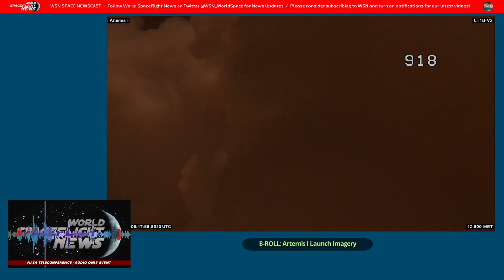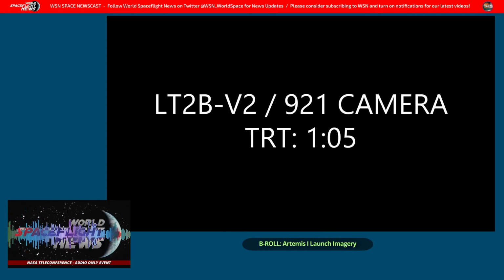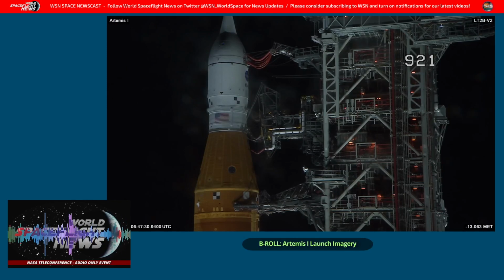So the job of the Artemis I crew module is not complete. We have taken the heat shield off. We have removed the avionics that's needed for Artemis II. We are in the process of doing, actually, when I say we, the exploration ground systems, Sean's team is doing all the work for us, doing the decontamination and starting to, for example, pull the TPS backshell panels off and such. So we've been doing a lot of that work, and then we'll be getting the spacecraft back from Sean's team, and then we will reconfigure that for the ETA test that I described going forward.